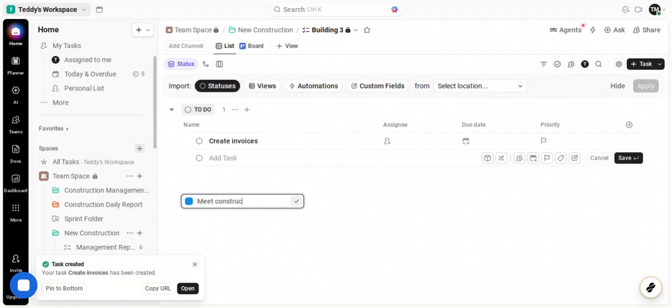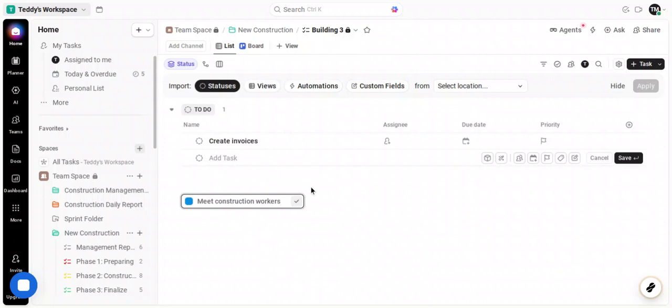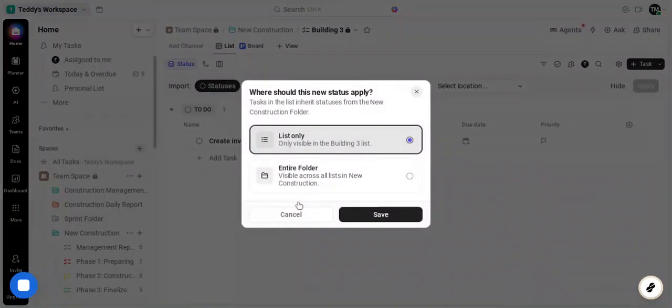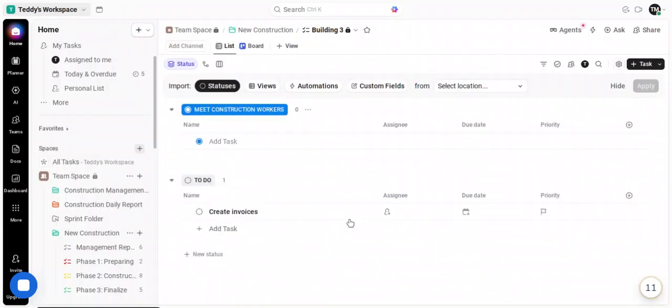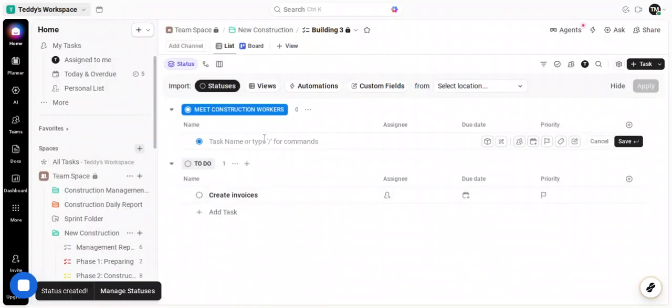Open the task and enter the essential details. Use the description to capture context, requirements, and any acceptance criteria. Then set a time estimate. Click where the estimate is currently empty, choose 3 hours, and apply it. This estimate is important. It helps you plan capacity, spot bottlenecks, and compare how long work actually takes versus how long you think it will take. Over time, consistent estimating improves forecasting and makes prioritization easier. If your team logs time, pairing estimates with tracked time gives you solid data for future planning and retrospectives.